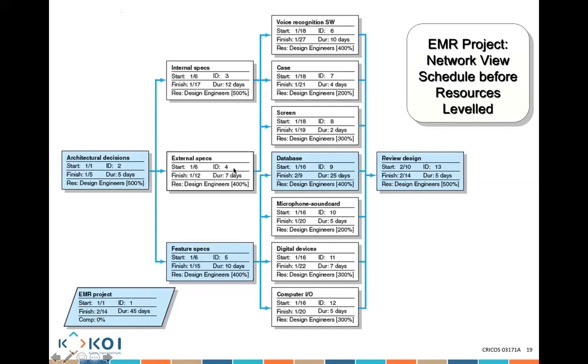Yes. Okay, 500 plus 400 plus 400 means I have 1,300. I am over allocated. I only have 8 people, but I'm allocating 13 people. If you look here, in 400, 200, 300, 400, you see so many more people being allocated than I actually have resources available.